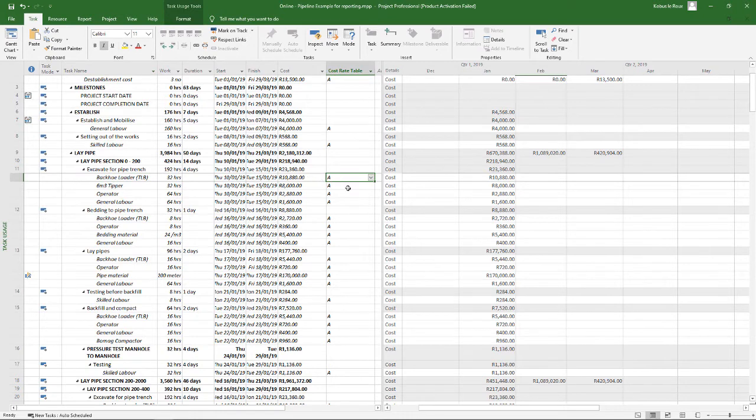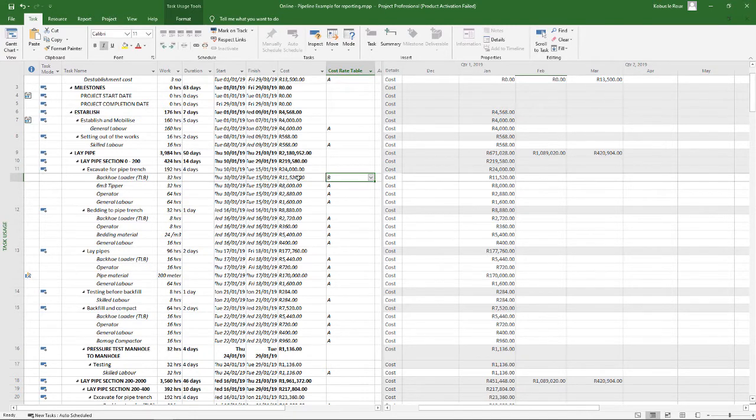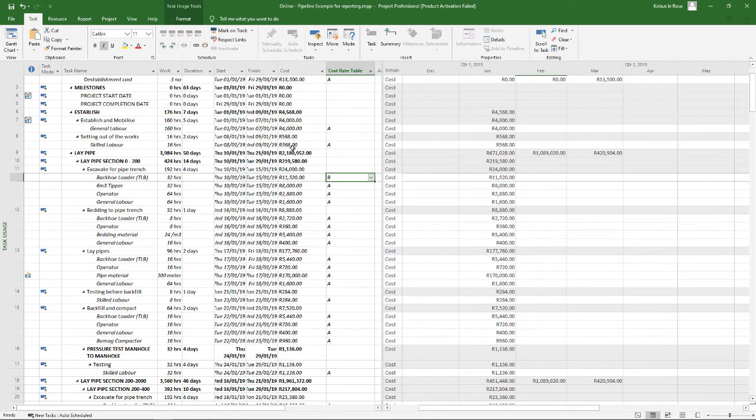So let's say on this particular project there's my TRB, so I'm not going to use the A rate here, I'm going to use the B rate. Then you simply use a drop down and see what happens if I select that. It changes my cost rate, well the cost based on the rate now to the B rate, so it takes the amount of hours multiplied by the cost per hour.